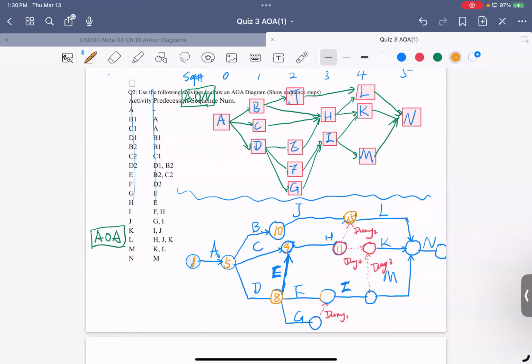And this is a small number, doesn't really matter. You give 11, you give 12 here, you give 13 here. And this is intermediate, so you give 20 here, and you give 16 here, and make sure you give 14 here, and then 25. Something like this. Just make sure your starting point is less than your ending point.